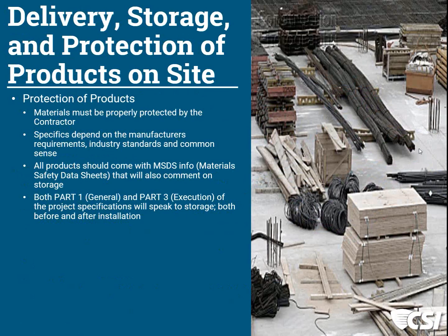So first piece, having it in the specifications clearly. Second piece is absolutely at the pre-construction conference, going over how you expect these kind of things to be maintained would be really important. And another chance for everyone there to hear how serious your firm is about the protection of those materials. So I think beforehand, before the bid, and once you're getting started are two places it would be critically important to focus on that.